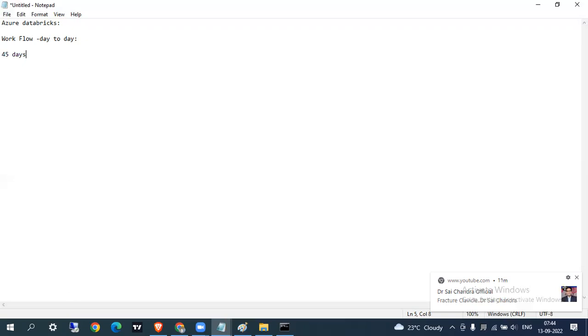You will have a developer environment. After development is done, they push to the testing environment, QA or UAT environment. There you test it. From QA there might be a pre-production environment in some projects, or else directly to the production environment where the actual go live happens.